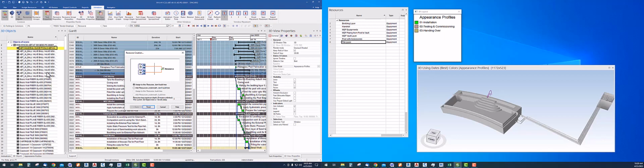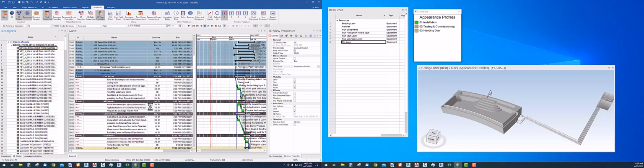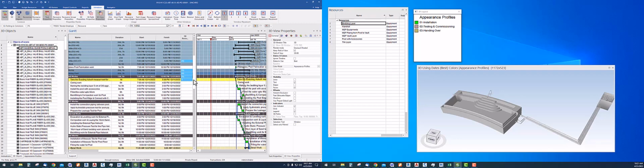Okay, so when I am dragging and dropping it, it is asking me some settings. I will keep the default one and I will choose finish. So whenever I select the bedding layer, you can see that this 3D is selected with these resources. And then I can click and drag it to the task which I want to assign it. When I click here, now this has assigned this 3D.